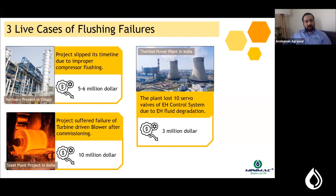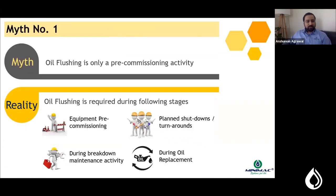Myth number one: oil flushing is only a pre-commissioning activity. In reality, oil flushing is certainly not only a pre-commissioning activity. It is required during planned shutdowns and turnarounds, after breakdown maintenance involving replacement of equipment parts, and it is a major activity you should perform whenever you replace the oil of a lubrication system.